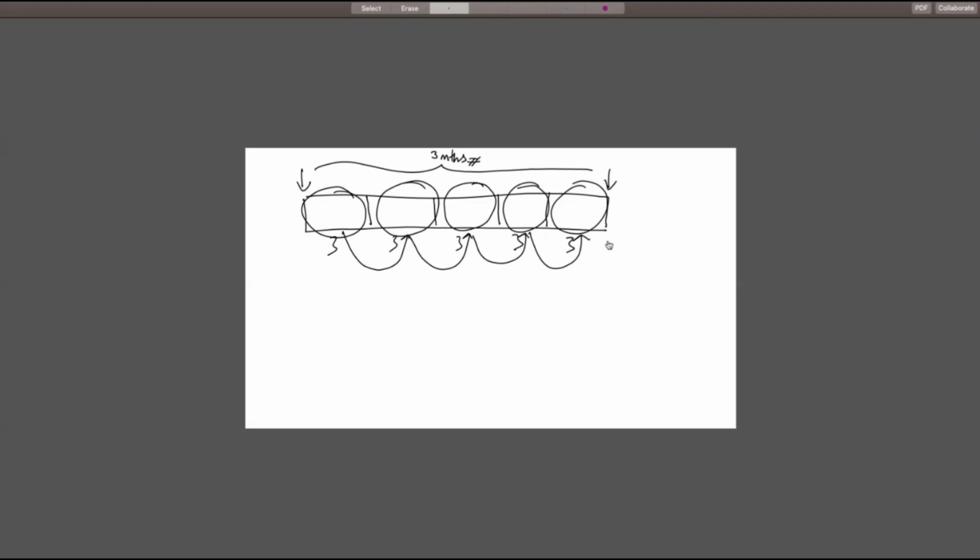So the advantage of doing it is manifold. Number one, because I'm breaking out into small outcomes, my output and my risk is smaller. And because it's smaller, it correlates to lesser stress, lesser budget.